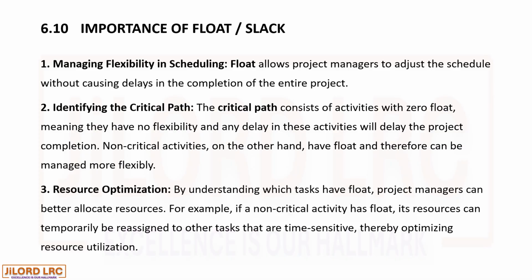3. Resource optimization. By understanding which tasks have float, project managers can better allocate resources. For example, if a non-critical activity has float, its resources can temporarily be reassigned to other tasks that are time sensitive, thereby optimizing resource utilization.